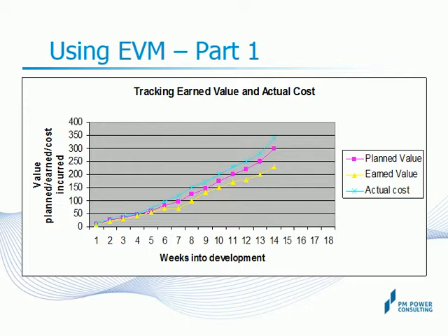Remember, we did not assign any EV for one of the tasks of the developer since some test cases had failed. This is called the 0 or 100% rule. That is, any task can have an EV which is either 0% complete or 100% complete and nothing in between. The 0 or 100% rule does not reckon any value for work in progress. This results in a rather conservative assessment of EV, which I would recommend any day. We will continue with some more analysis of this project in the next slide.